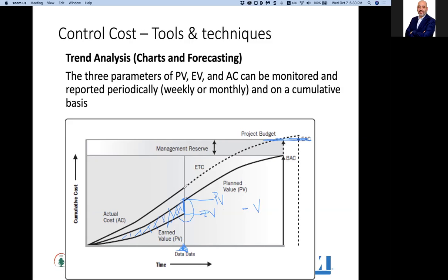طيب what about this cost كمان variance؟ لا الكوست فاريانس شو؟ معناها بالنسبة للإيرند فاليو كمان حيطلع نيجاتيف. اكيد أنا حقسم على الأي سي، لانه الاكتشوال كوست أوفر أي سي حيطلع نيجاتيف، او لانه حيطلع 0 بوينت. الاكتشوال كوست اعلى من الايرند فاليو رح يطلع لي نيجاتيف فاريانس.